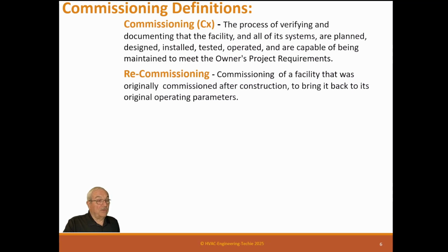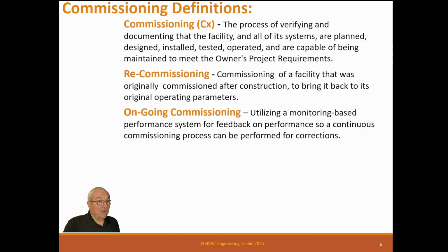And most buildings are not static. They make a lot of changes. They move people around, they move walls around, they move zones around. They bring in different heat sources. They do all this stuff that changes the original design. So if you just bring it back to the original design, you're not going to solve all the problems.